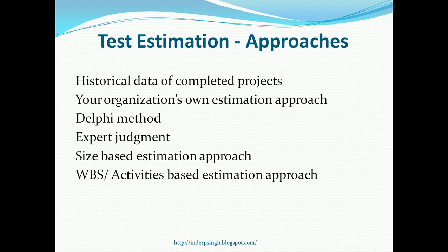One thing to remember regarding the approaches is that never rely on just one approach. At least use a couple of approaches and see if you're getting similar effort estimates. That will give you the confidence in your effort estimates if you are questioned by the client or the management.